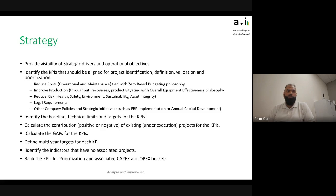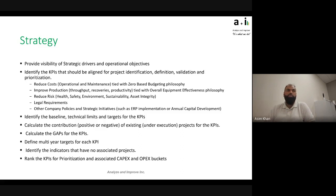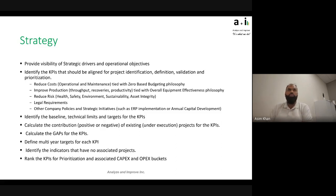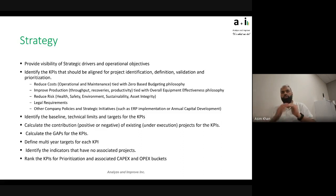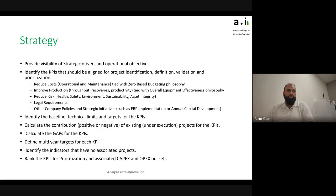Once you have those drivers and objectives, the steps are: identify where you are and where you're aimed to go — that's the baseline and technical limits for each strategic KPI. Calculate the contribution — positive, negative, or existing — of projects already underway against those KPIs. Calculate the gaps and define multi-year targets. We don't have to go from zero to a hundred in one year; we figure out how much of a jump we want to make and what projects we need.